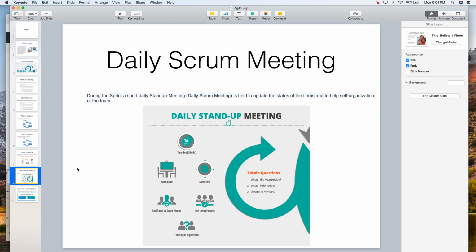The Daily Scrum meeting is just something where you go over updates, right? So you have 15 minute meetings every morning, same place, same time, and someone starts up the meeting. That's the person you call the Scrum Master, right? The full team is probably present.